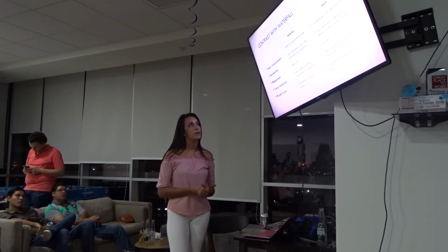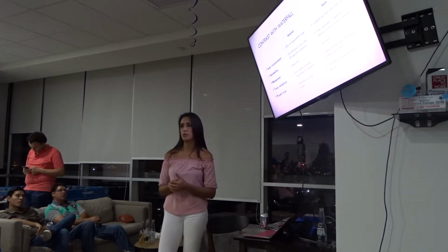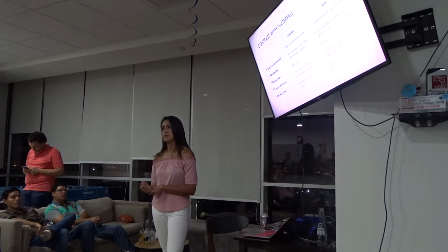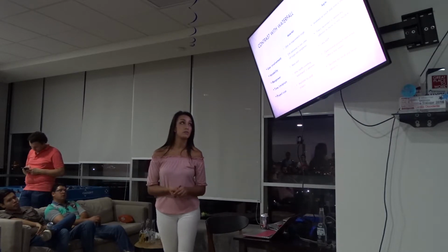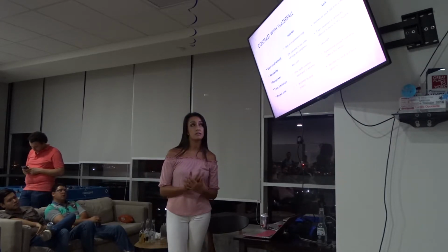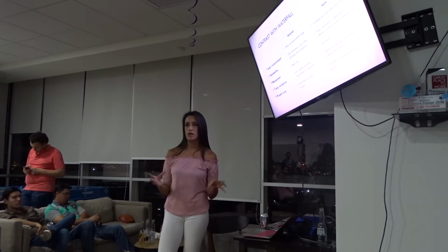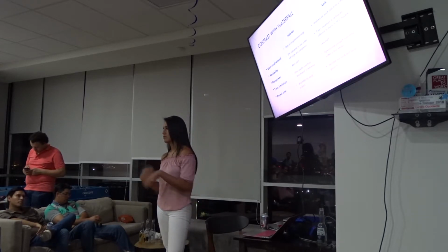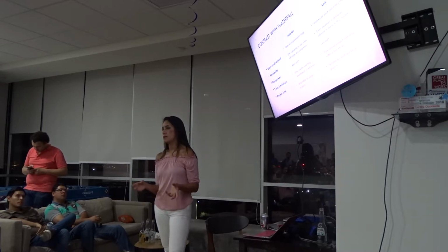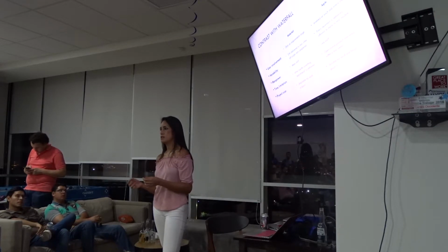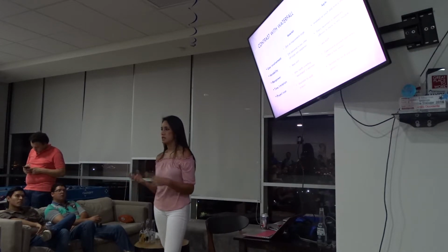Some other things to compare: as we know, in waterfall the software is delivered after all the stages are completed. You can't deliver software at the design stage. You don't have something valuable, something that adds business value to what you're doing. In agile, the way of work is incremental. So you get together and work on one module, and you can show it to the user, and he can see if it's working all right or not, if he's okay with it. If he says, you know what, I need to make another change, you can still give him something operational that's working, and then make the changes he's asking for.